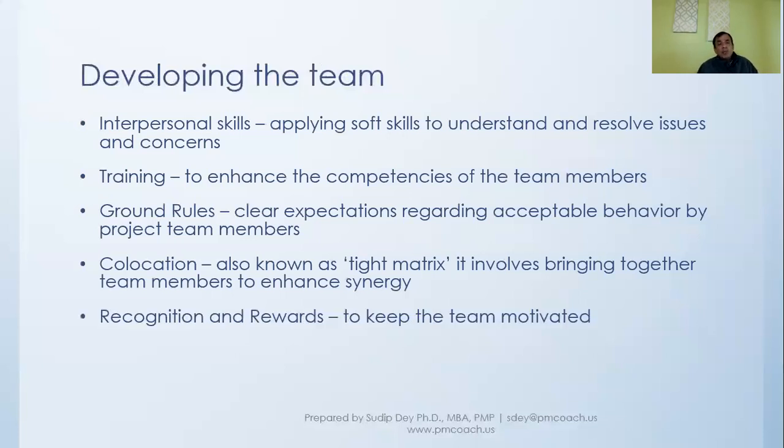Then you have to think about recognition and rewards. Now, recognition and rewards, essentially the whole idea is to keep the team motivated. And so you have to think it through carefully. For example, this recognition and reward should be throughout the project. It is no use giving it just at the end of the project to whoever has done the best, because it has not played a role in keeping the team motivated.